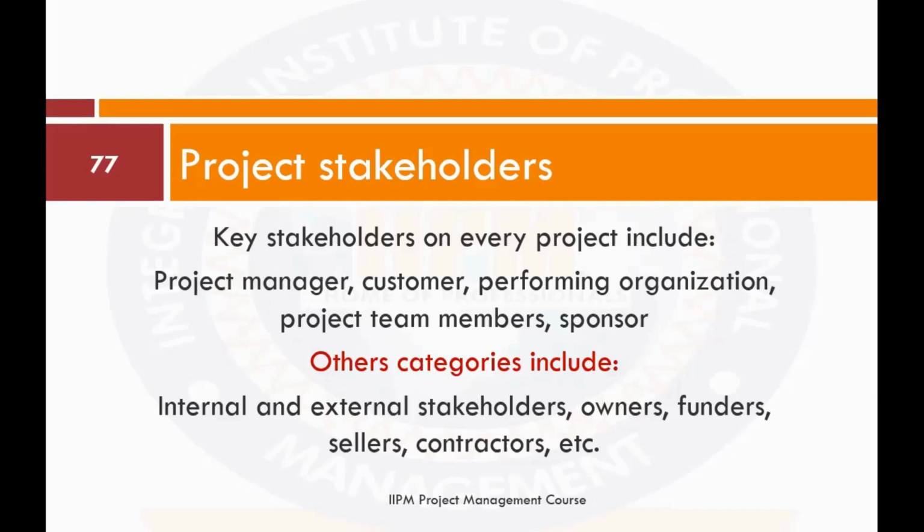Why did we have such an issue? Maybe because we didn't really consider them as major stakeholders. Irrespective of the fact that they were considered minor, at the end of the day, because of their involvement, they became major.